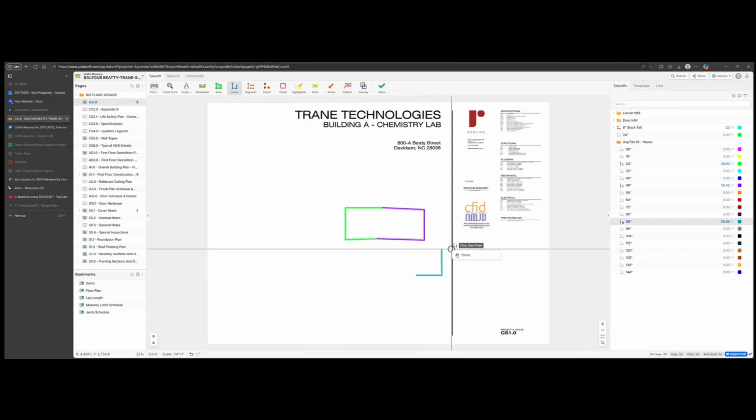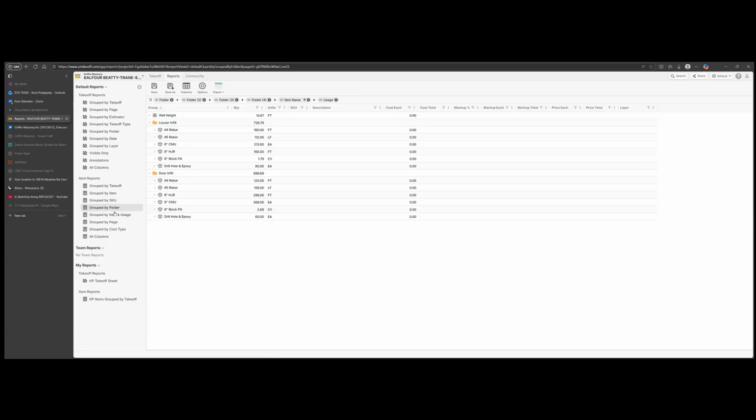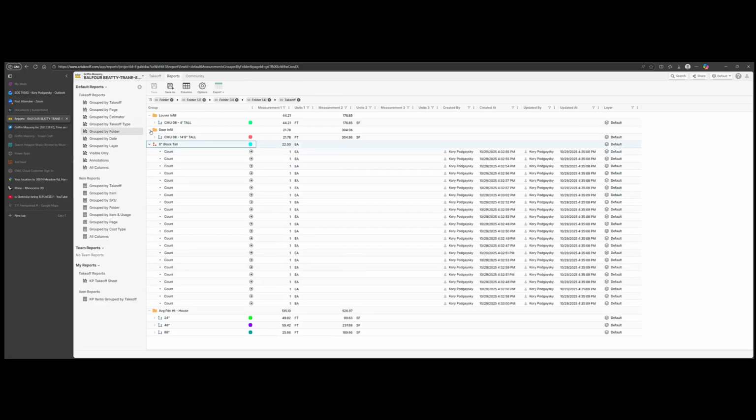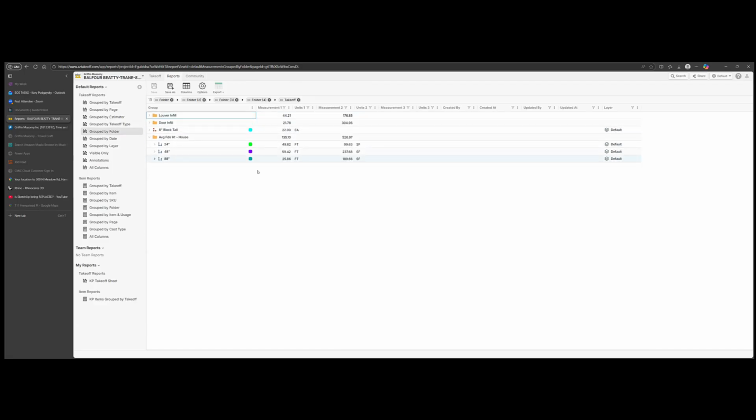Nice. And you've then got them color coded. It's nice. Yeah. So right now we're just kind of doing that, bringing it over here, and then getting a total linear footage, total square footage, doing the math to figure out the average height. But like when we were doing PlanSwift, we had the same thing built out, but actually had a formula in the folder name to where the folder name actually did the math for us. So you just traced them out and it told you what the average height was.